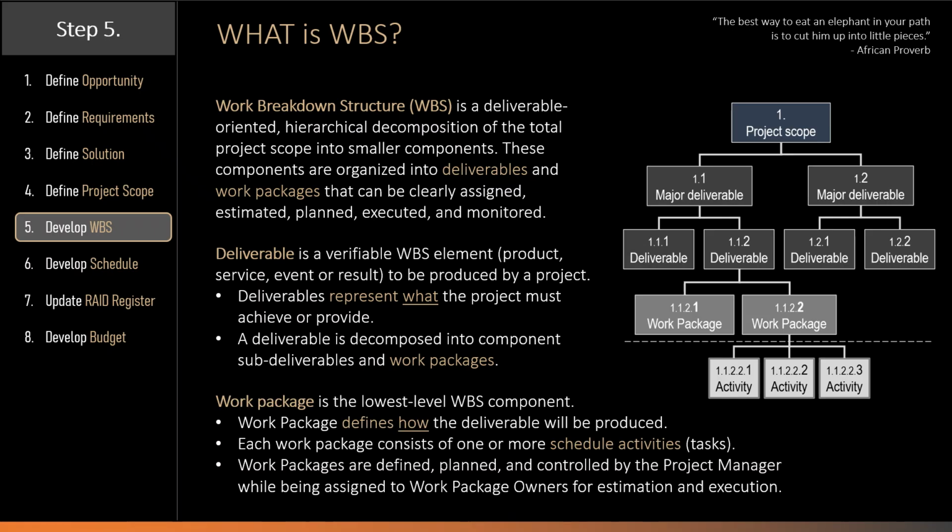Work packages define how the deliverables will be produced. Each work package consists of scheduled activities or tasks required to complete the work package. Work packages are planned and controlled by the project manager, while ownership of the work packages for estimation and execution is assigned to work package owners, who might be individual project participants or teams.